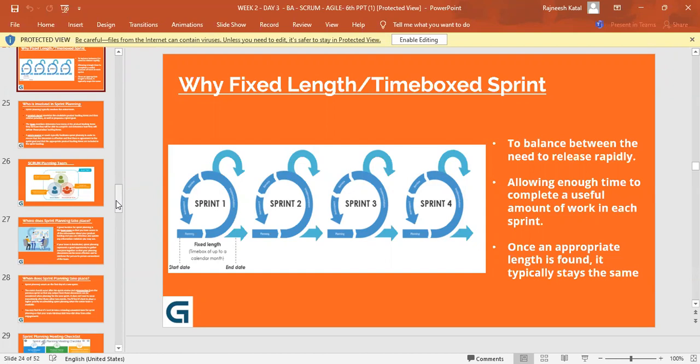I'll take 6 weeks. No, if you think it is going to take 6 weeks, you have to be upfront in the beginning and say that this is additional work we'll do in the next sprint. In this particular sprint of 4 weeks, I'll only be able to deliver this much. Okay, so this is how you communicate.